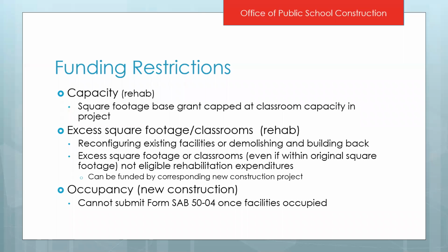Likewise, if you reconfigure a facility, let's say you have a very large classroom and you add a wall to break it into 2 classrooms, but your square footage remains the same, you are still adding capacity to the site. So we will now see a site with 2 classrooms versus 1, and that extra classroom will also need to either be privately funded or funded by a corresponding new construction project.